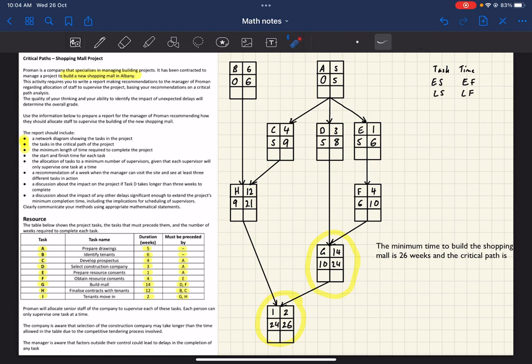So we've done everything leading on from I. Now we look at the ones that we've just looked at. So this is not in the critical path. Let's look at this one. Since this one's not in the critical path, because this one only leads on to this, that means that this one's also got 3 weeks leeway, because this one doesn't have to start for another 3 weeks, so that one can finish 3 weeks later and it would still be okay.